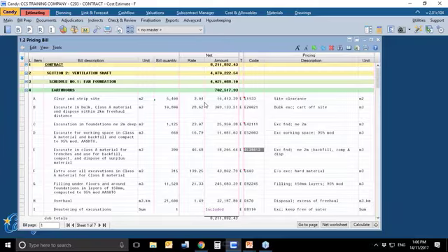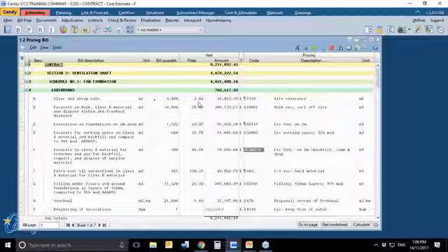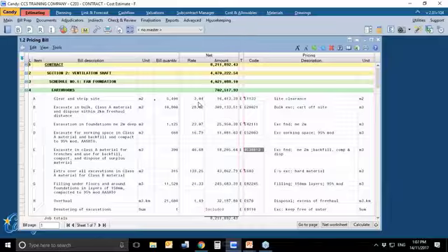Now, what you would notice is there's no mention of what currency this rate is in. Is it in dirhams? Is it in US dollars, Omani riyals? I don't have a clue. That's the first thing that you would do when you start up with a job: go and define your pricing currency or your base currency. Now, where do I go about to define my pricing currency?